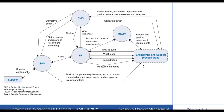The Project Planning process area includes developing the project plan, involving relevant stakeholders, obtaining commitment to the plan, and maintaining the plan. Planning begins with requirements that define both the product and the project. The project plan covers the various project management and development activities performed by the project.